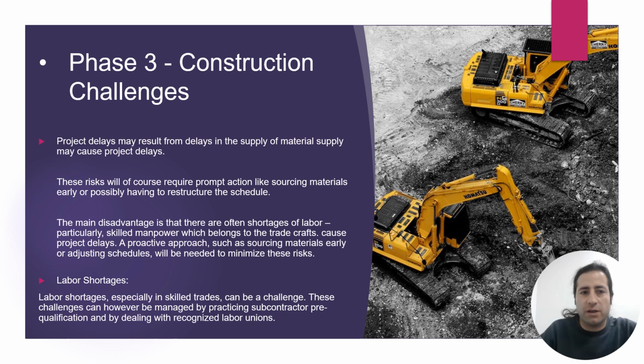Construction challenges: project delay may result from a delay in the supply of material. Supply issues may cause project delays. This risk will, of course, require prompt action, like securing materials early or possibly restructuring the schedule.